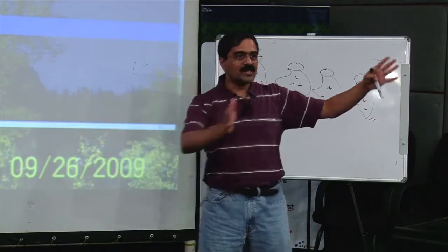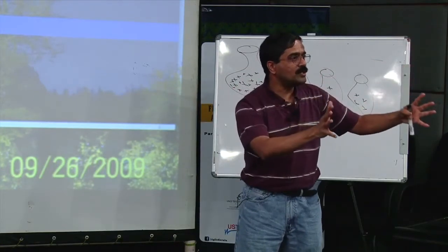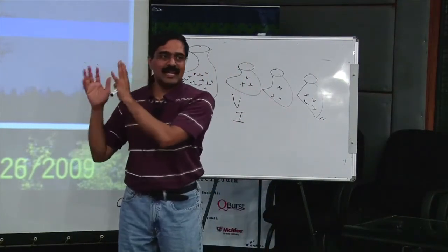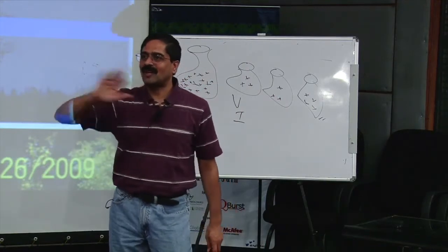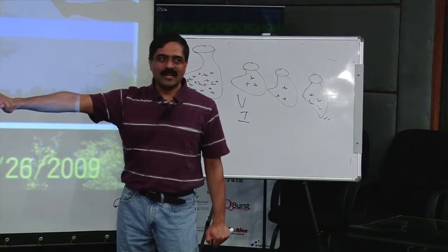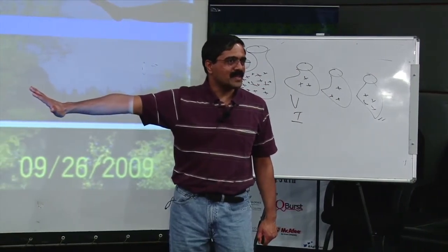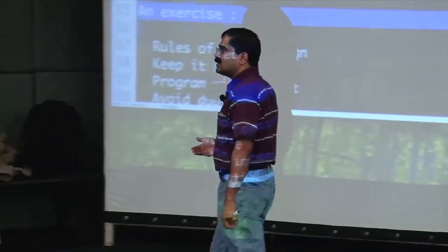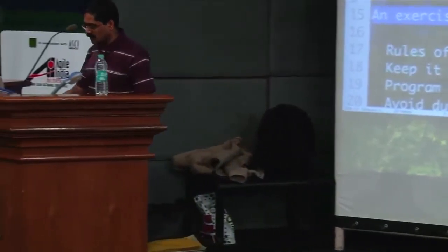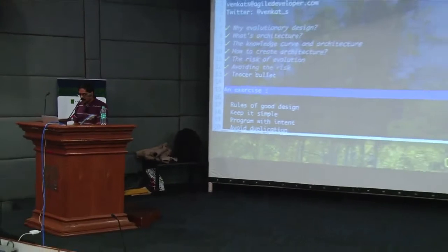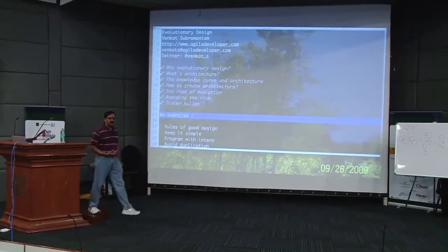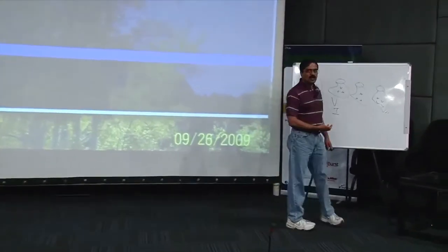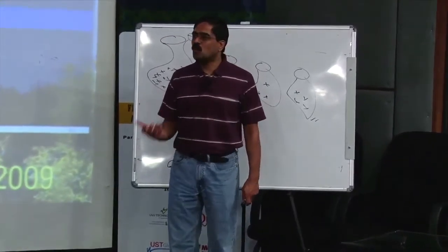And what do I do? I consider things that are most expensive and hard to change, and I do it first. And the things that are the easiest to change and less expensive, I postpone until the last moment when I no longer can postpone it. Make sense? That's exactly what you do to eliminate the risk: you eliminate the risk by prioritizing what you do. But if I'm developing an architecture, but if I have pieces in my architecture that are not done yet, how in the world can I know that these things are actually going to work?